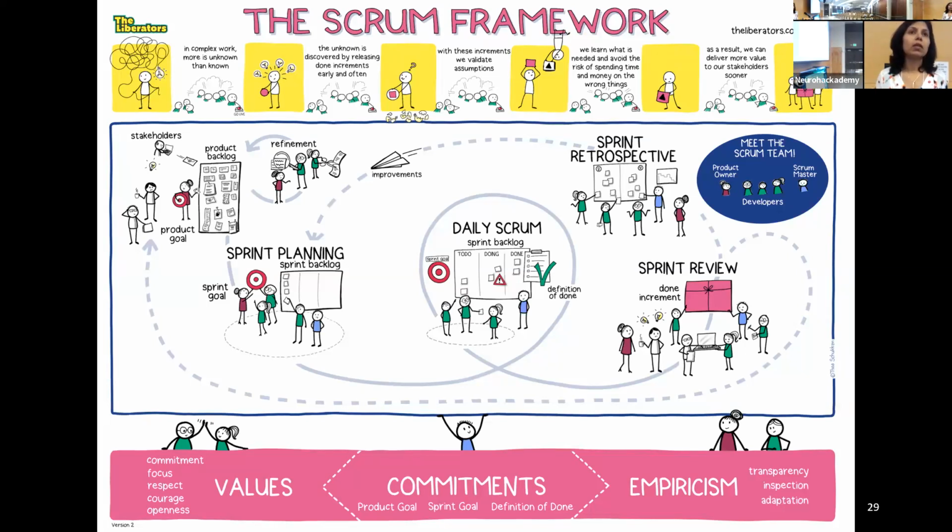Yes. To build on that question, what if you're not sure how many hours it will take you? What's the best way to scope it out? Then it seems like you need to assign a task to do the research that will help you get to that estimate.